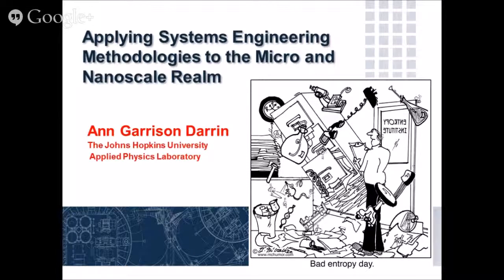You pick one member of the team to be the requirements monitor. At some level, you know a certain set of activities. We, for example, have to sit in a standard deployer. We can't change that external envelope. That's a constraint that's handed to us. We can't violate that because we can't get to space. So you had one person who was handed that sort of scepter and said, watch it at every minute, that we don't violate those constraints that we are handed, because otherwise we just couldn't fly. So that was very, very successful.